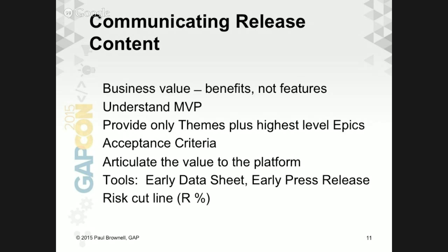This is a tool that I encourage product owners to start thinking about even before the release plan is complete, where you have user stories. Begin to have these are my really important themes, and these are my secondary themes, or this is what my MVP is, and these are nice to have. So it's good to begin thinking about it here, but it gets revisited at every stage.